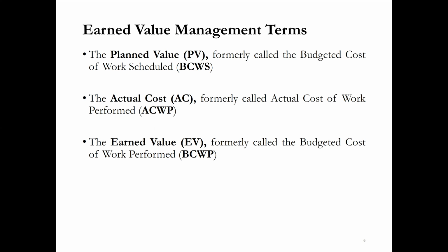Earned value is formally called the budgeted cost of work performed. So this is the earned value. This will be the value based on the work done. We will be claiming money or getting the payment from the owner based on the work done.